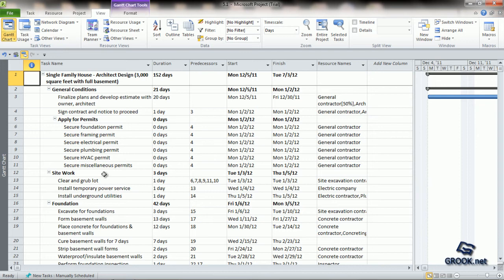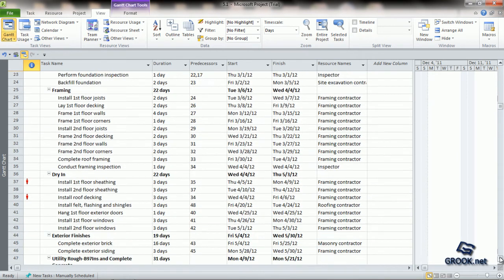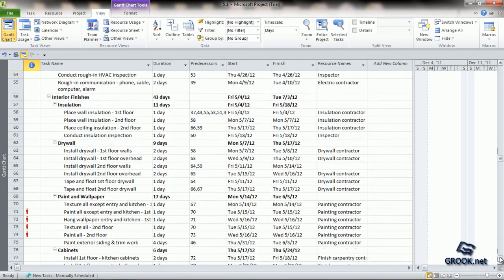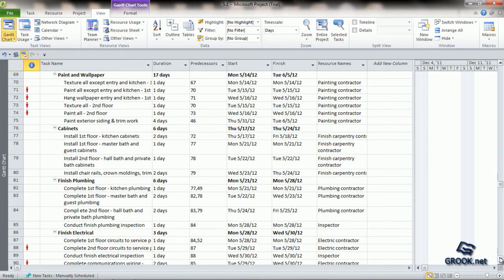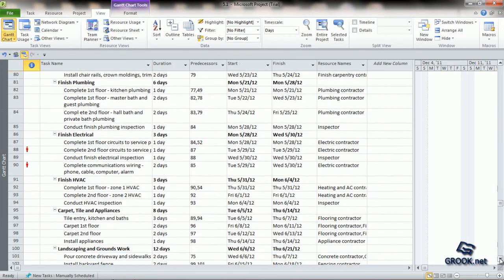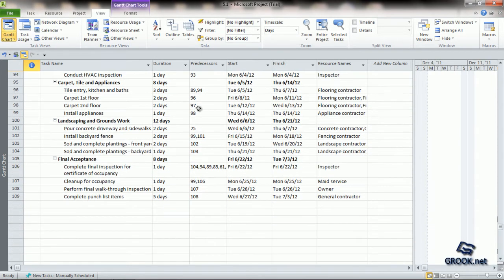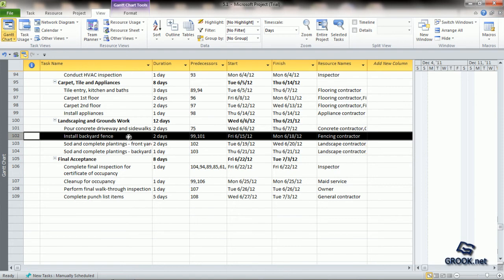Let us see how to activate effort-driven scheduling. Going back to our task list, let us choose a sample task — Task number 102, which is Install Backyard Fence. It takes two days and has one resource, the fencing contractor, working on it.